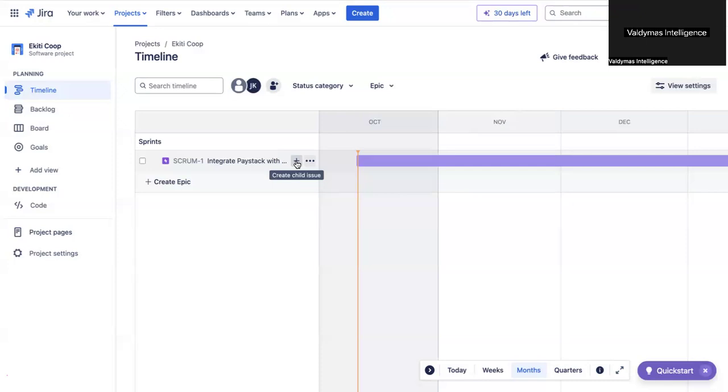But there has been a different school of thought. Some people would just say break down from epic straight into story, and if you go online, sometimes you even see from theme, to epic, from epic to story, and then from story to task. That's another form of breakdown. The most important thing is that you know you can break down sometimes from epic into feature, from feature into story, and then from story into task.